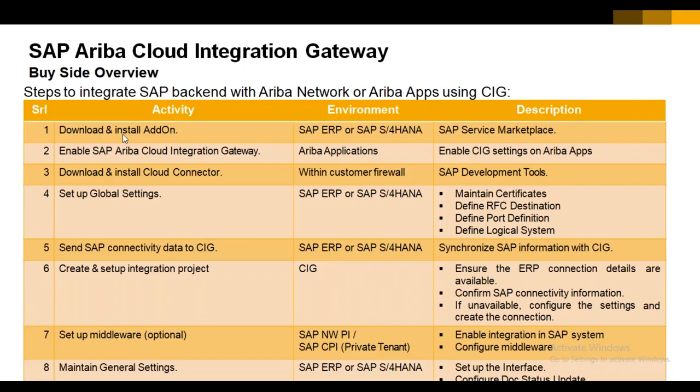Let's say, for example, one customer is going to implement all the features of the SCC. In that case, one consultant will not be enough. We require at least 2 to 3 consultants minimum, right? So it depends on the scope, whatever features you are going to implement. Based on that, he has to form one team.